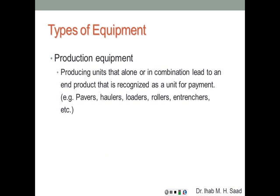When talking about equipment, one major classification distinguishes two types. Production equipment produces units that alone or in combination lead to an end product recognized as a unit for payment. Examples include concrete mixers, asphalt pavers, haulers, loaders, rollers, and trenchers. For example, a trencher produces trench excavation measured in cubic yards or linear feet, which is an end product by itself.